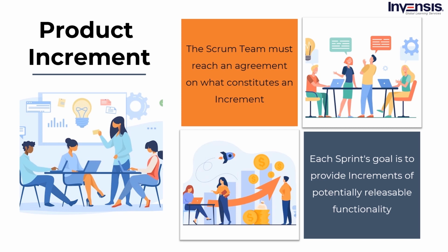Every sprint, teams release an increment of product features. Because this increment is usable, a product owner may opt to release it right away. Each increment is additive to all previous increments and properly tested to ensure that they all operate together. It is expected that as Scrum teams grow, their definitions of increments will grow to incorporate more requirements for improved quality. Any single product should have a definition of increment that serves as a guideline for all work done on it. This was about product increment.